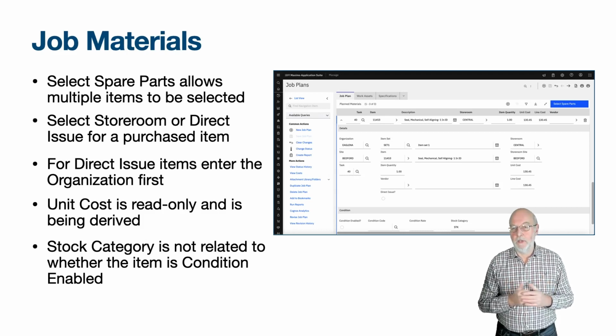Don't forget to enter the task if you are using tasks for labor, the task where the item will be used. For long duration jobs with several tasks, some of the initial tasks could be completed if you choose, even if the item is not available. If you leave the task field blank, then you are saying the item needs to be available to start the work order.